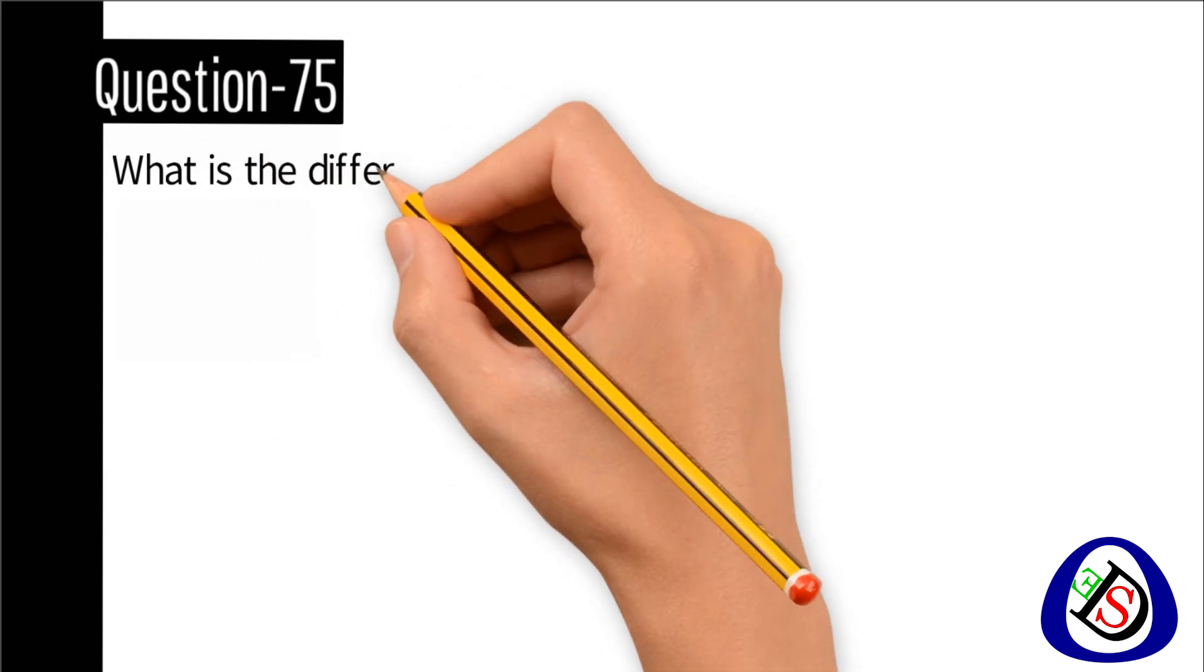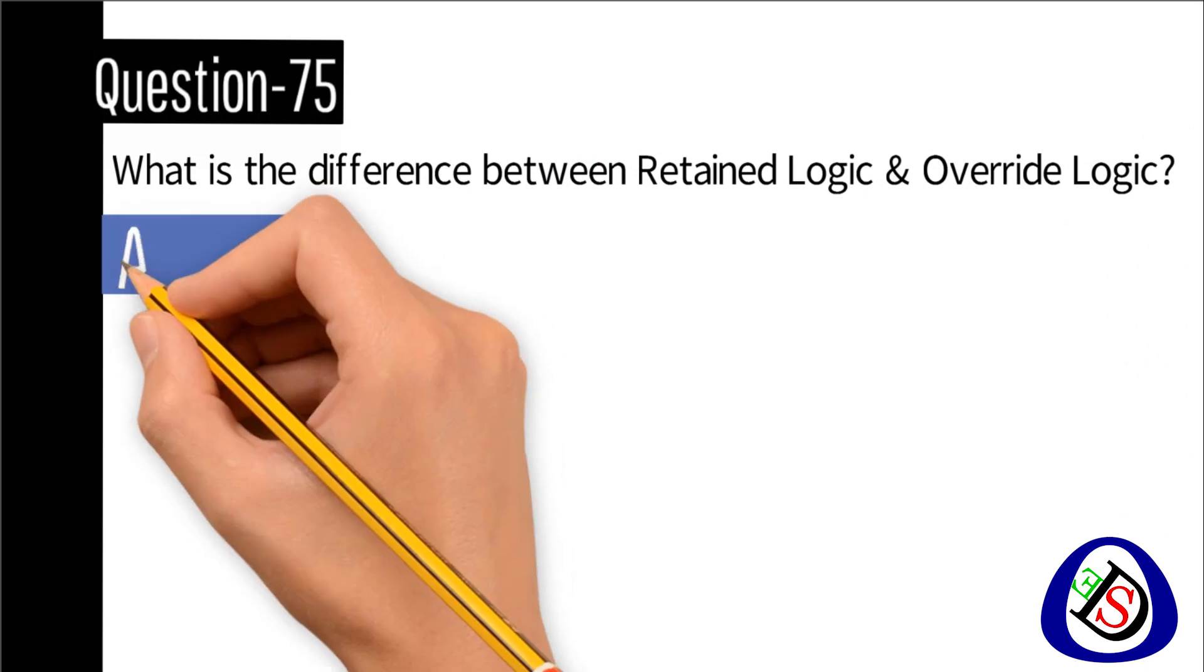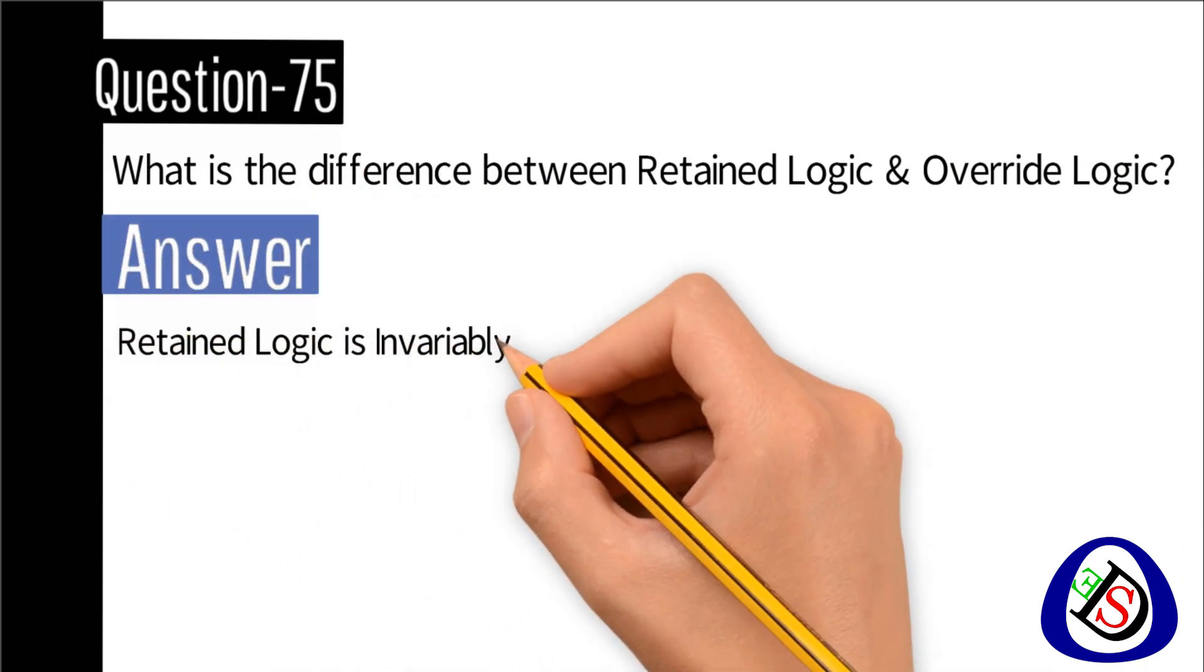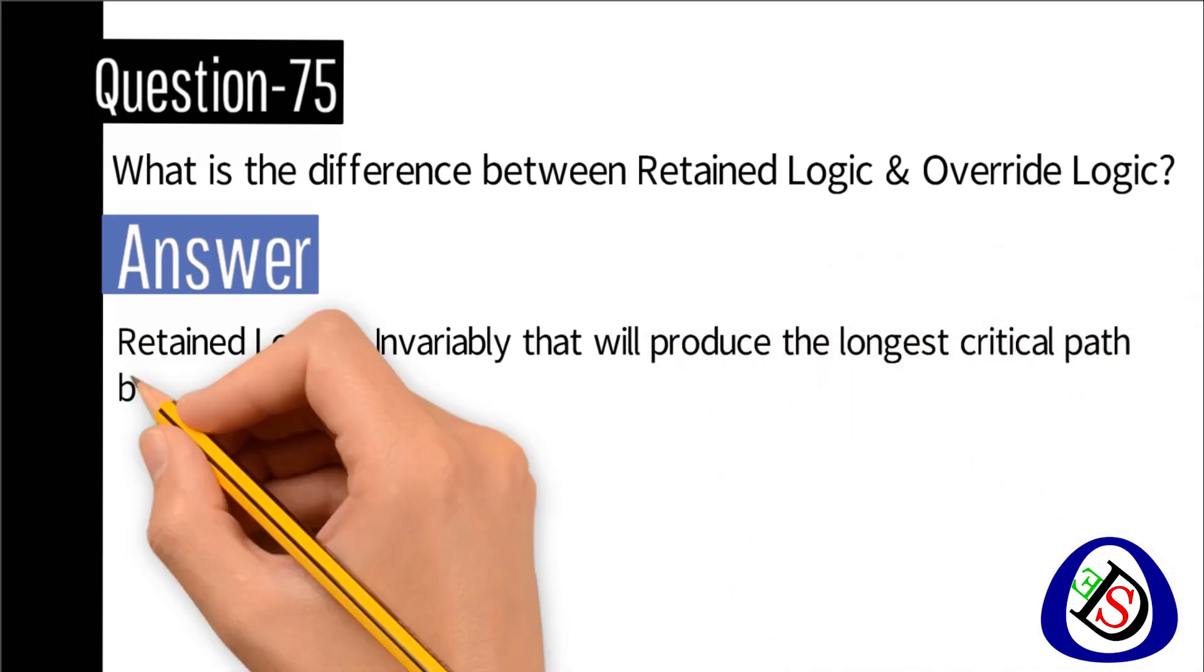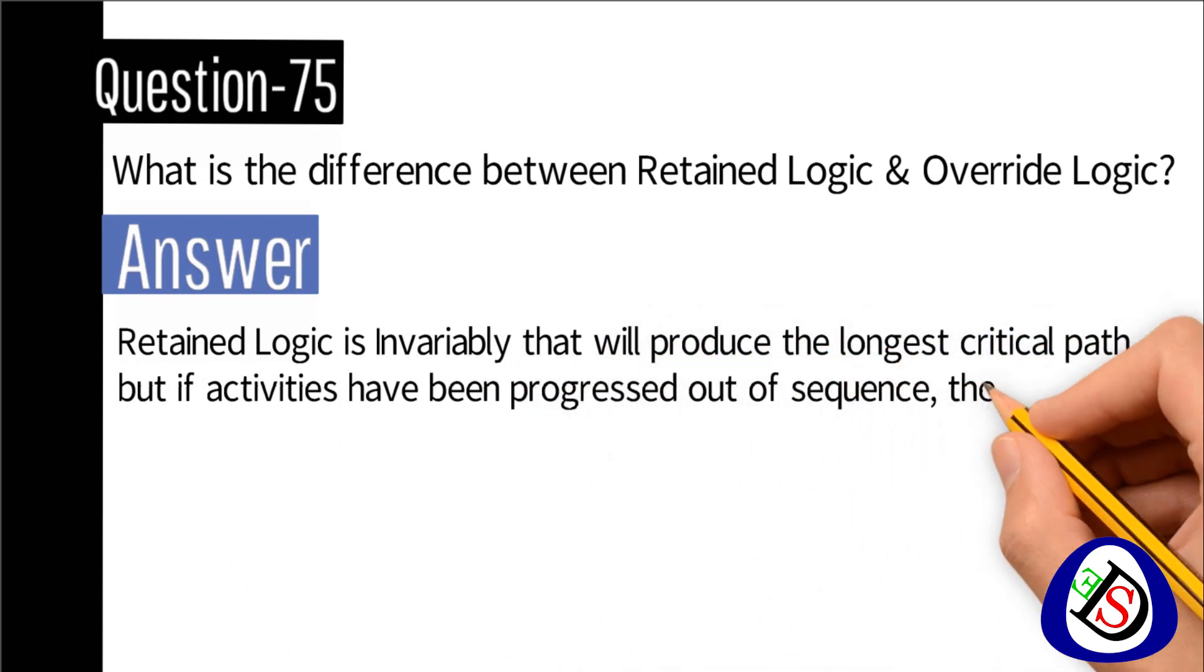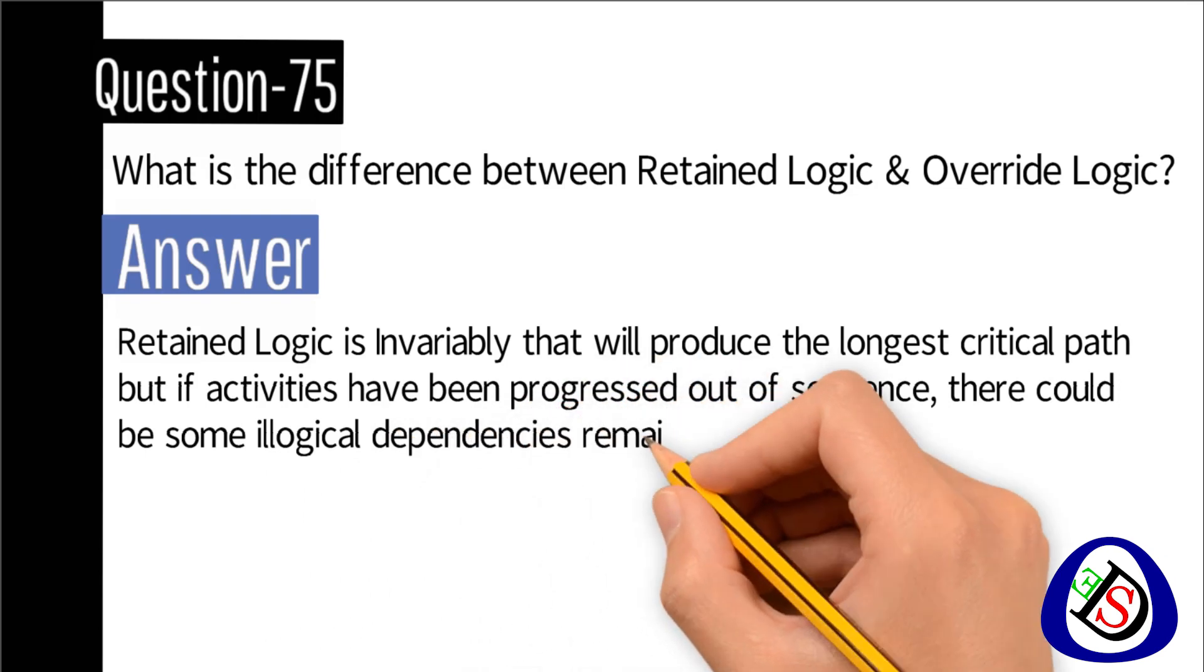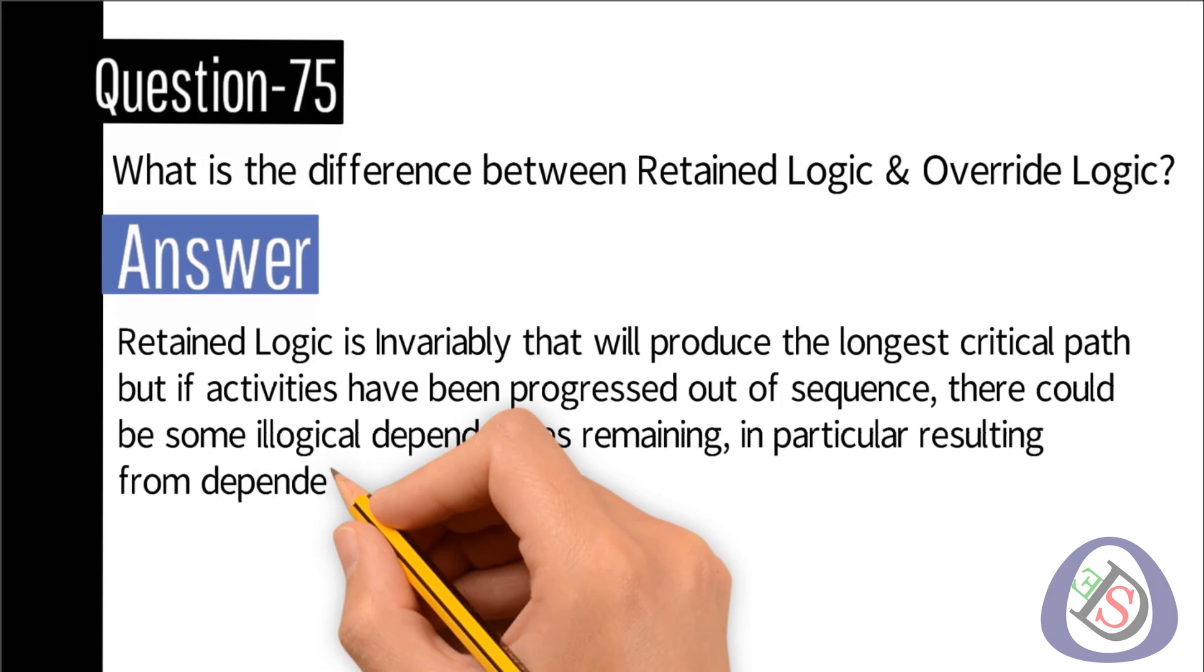Question number 75: What is the difference between retained logic and override logic? Answer: Retained logic is invariably that will produce the longest critical path, but if activities have been progressed out of sequence, there could be some illogical dependencies remaining, in particular resulting from dependencies with duration.